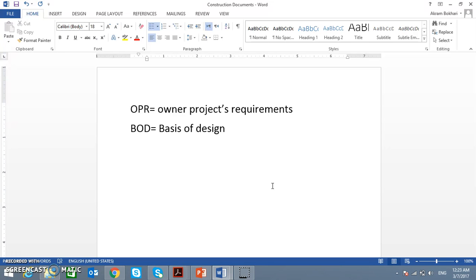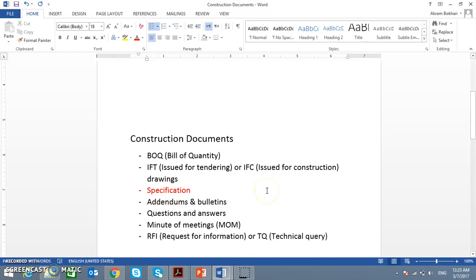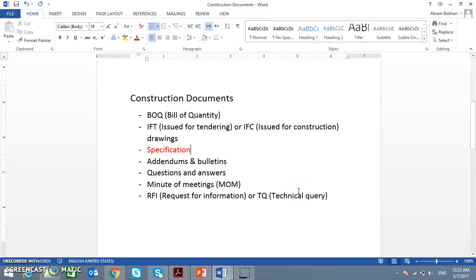The winner of the bid is handed over a CD — construction documents. This contains the BOQ (bill of quantity) and IFT drawings (issued for tendering) during tendering. But once the project is won by a company, these become IFC — issued for construction drawings. The winner is also given a specification, addendums and bulletins, questions and answers from the bidding stage, minutes of meetings, and RFI (request for information) or TQ (technical query).